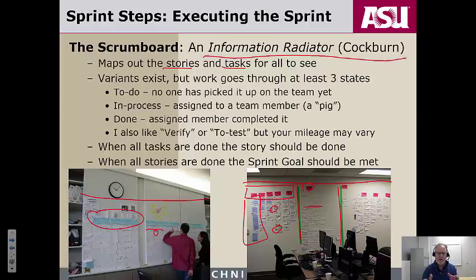The team starts assigning things that they're going to work on. Remember, I talked about for you guys at most 2 at a time, and in a lot of places only 1. You basically grab a task card, you grab a sticky note, you put it under in progress, and you put your name on it and say, now it's in progress because I'm accepting responsibility for doing this task. All right, and there could be several tasks that are being done according to that one row.